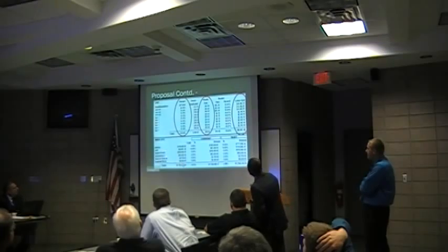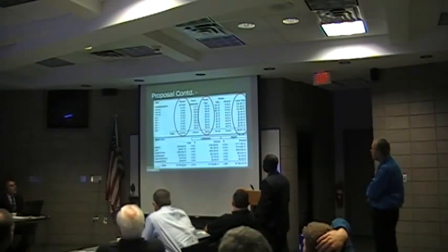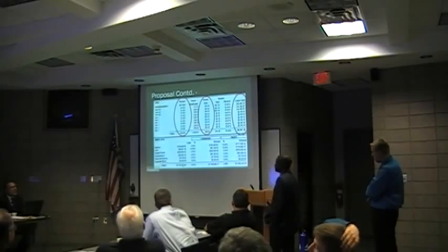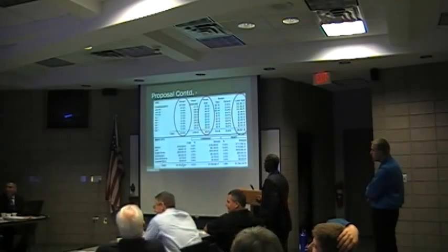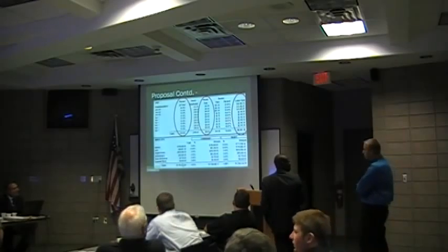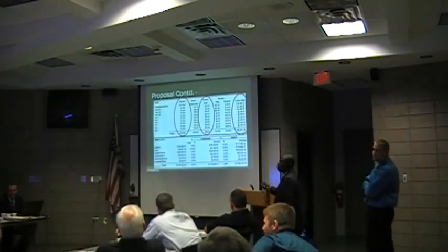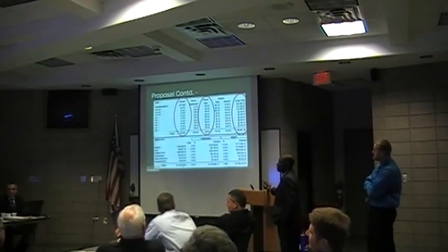What would be an example of what you would include in direct job expense? This is it, 3,750. What did you put in it? Remember the info that you put there as a direct job cost? Trailers, toilet paper, tools, pencils, cell phone use, things like that. Coffee, plenty of coffee. We put 5,000 for the direct job expenses.